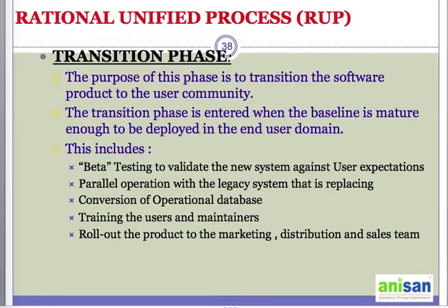The transition phase is entered when the baseline is mature enough, so that at least the basic features and functionalities are available and it can go into the user domain. Mature enough means it has gone through all the testing, unit testing.